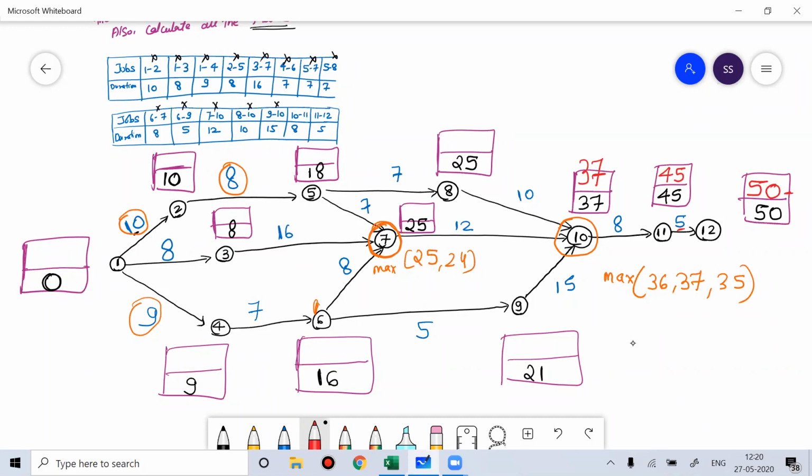From right to left hand side, you see a rectangle that I'm filling, where the bottom part of the rectangle talks about the earliest time, and the top part of the rectangle talks about the latest time. When you fill the earliest time, you use a method called forward pass calculation, and when you fill the latest time, you use the method called backward pass calculation. You go from left to right for one, and from right to left for the other, filling in the data.